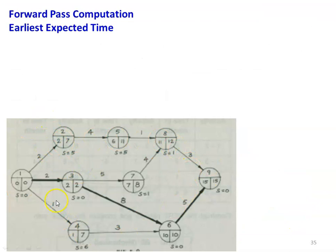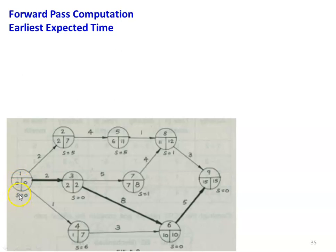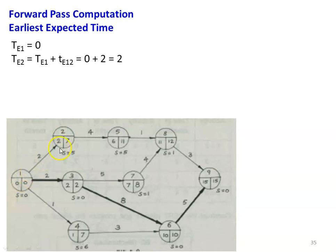Now the network is drawn with all the values. We will see how the TE and TL values and slack values are calculated. For the forward pass computation, we calculate the earliest expected time. In the event node, we divide into three parts: the top is the event number, the bottom-left is the earliest expected time TE value, and the bottom-right is the latest allowable occurrence time. TE1 equals 0; the first event is assigned time 0. Then TE2: there is only one incoming arrow, so TE2 equals TE1 plus t(1,2) equals 0 plus 2 equals 2. Then TE3: again only one incoming arrow, so TE3 equals TE1 plus t(1,3) equals 0 plus 2 equals 2.